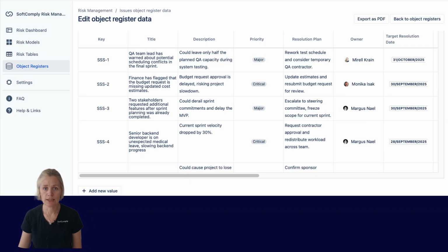Next, we have issues, things that are obstacles today and can turn or escalate into risks. The key point is that risks do not actually come out of nowhere. They are issues first. And that's why issues are important to be managed. The issues themselves can come from wrong assumptions or unmanaged dependencies. And if you have an issue, we can already know what action to take when it escalates into a risk. And this is how you can keep unpleasant surprises from happening. Each issue has its own owner and a resolution plan should they actually be realized.